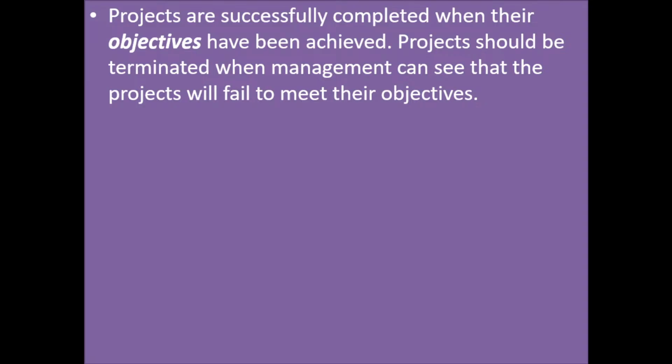He will say we reduce everything down to the foundation so that we have a foundation that will carry 4, or we have inbuilt pillars that will take the weight of the extra 2. But those things were ignored. And after 2 or 3 years, the structure said, I can't carry the load anymore. And it caved in. That is one example.